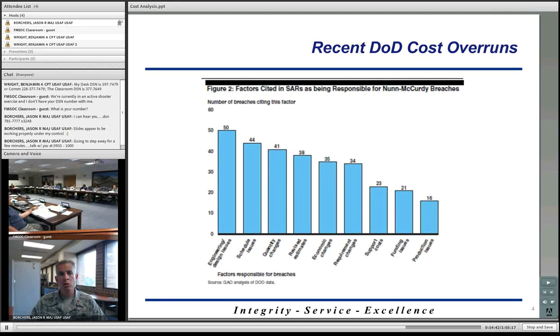One will be the program office cost estimate, and the second will be the cost estimate produced by the independent entity. In the Air Force, it's AFCA. The two teams will then reconcile the two estimates, and you'll ultimately arrive at one single estimate that will go forth.